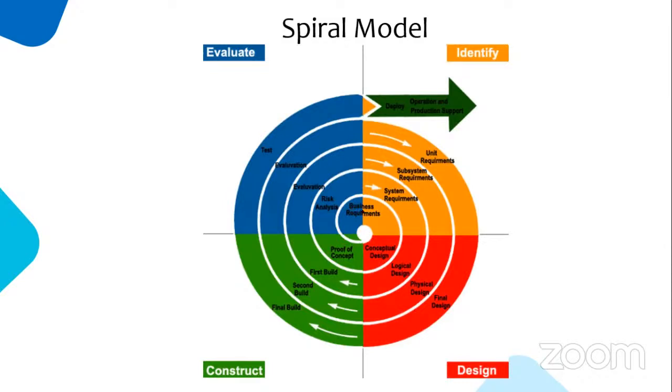We got a few requirements, and for that they will first analyze the requirements, and then based on that, they try to create a proof of concept. Means, okay, this is how the product should be, like a prototype. It will be like this, and once you get that, analyze the risk, then add some system requirements to that.